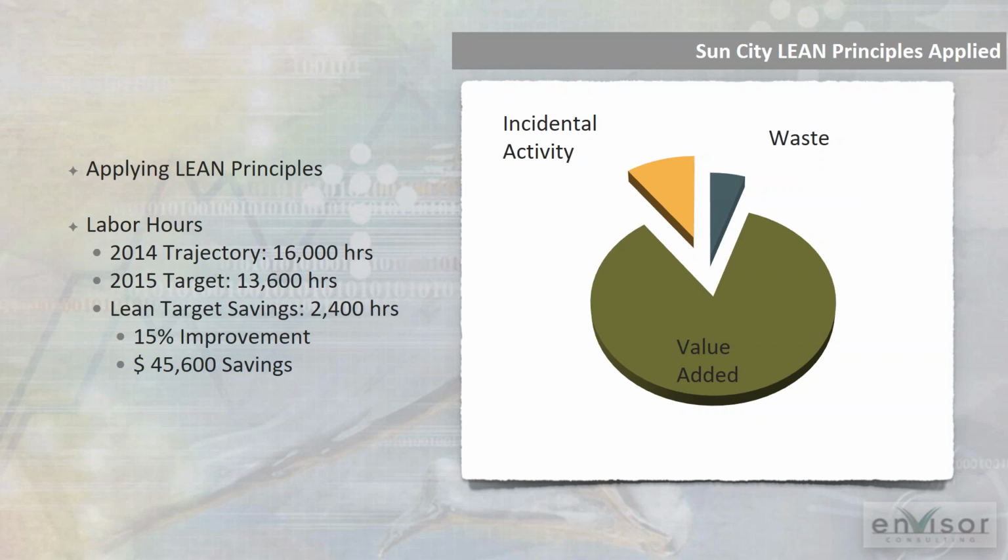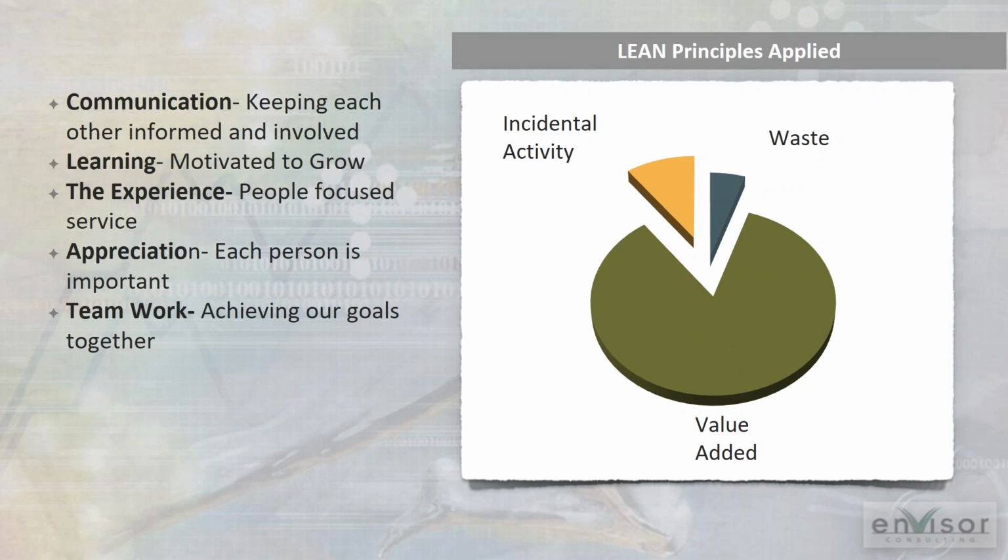They're not repetitive, so there's a certain amount of estimating that you have to do, whereas with a maintenance job, you can actually measure the task times. But the principle is eliminating the incidental activity, and if you can't eliminate it, at least reduce it. Eliminate or reduce the waste as far as you can to drive up the value added.